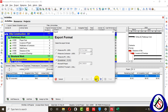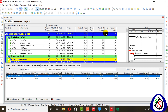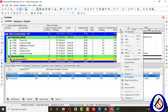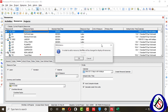For the spreadsheet export, there are five types of data you can export: Activities, Activity Relationships, Expenses, Resources, and Resource Assignments. Before exporting, I will first set up a cost loading resource. I'll go to Resources and add a new resource to load cost.